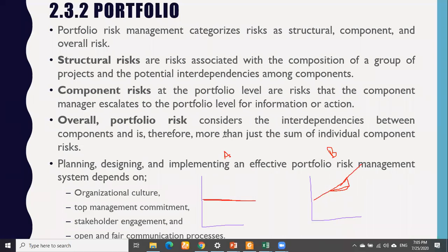And it does not mean that whenever we combine the individual component risks, we will say the total of that risk will be known as overall risk. No, as I told you, there will be a different level of risk in different components. And whenever we are combining them together, it does not mean our risk will increase, because we have to see the relationship between these components. If the relationships are negative between different components, the combination of those risks will actually work as an elimination.